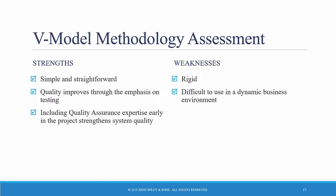However, the V-model still suffers from the rigidity of the waterfall development process, and that is not always the best for the dynamic nature of a business environment. If you're in an environment where requirements are likely to change over relatively short periods of time, the waterfall approach is not going to work, and you'll have problems with the parallel approach and the V-model approach as well. These are structured approaches, and they assume that you can have a good grasp of the requirements up front.